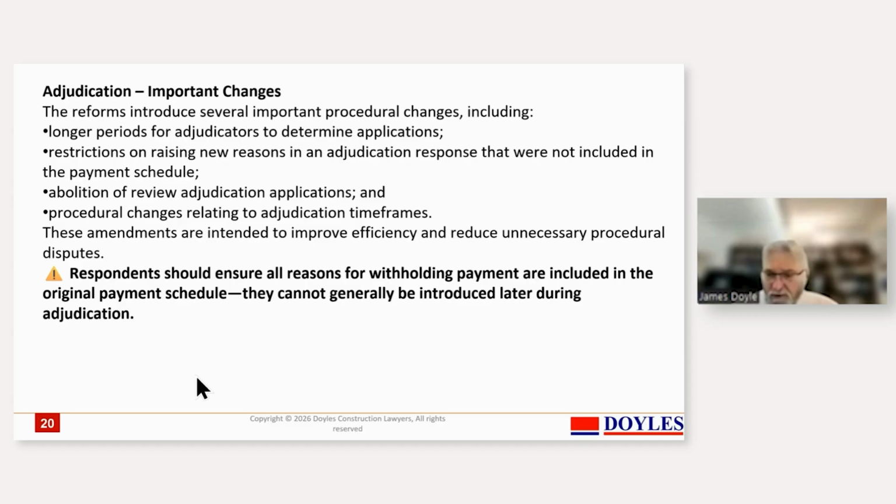It shouldn't be. You should raise your issues early. You should raise them when they're limited and small, but they're continuing, and then put them through the Act and encourage the other side to agree the umpire's decision, because it removes disputes early and it gives you a very good opportunity to negotiate. There's really no point in trying to negotiate where there's no pressure on the other side as to getting a resolution. So the idea is that you should put it up and say to the other side, look, we're happy to negotiate and get a reasonable solution out of this for everyone.